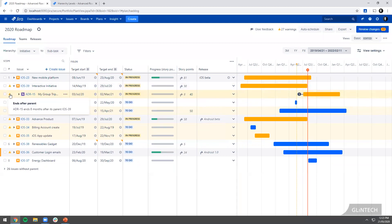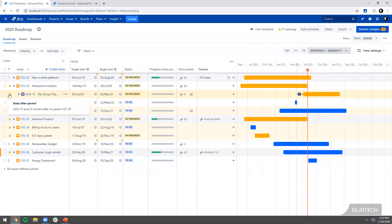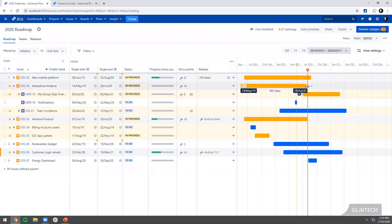This is quite common. It's usually because we've not updated the parent in some way. We've changed our plans, we started working on it, but we have not kept the left hand in sync with the right hand. What you end up with is a mismatch here. We need to keep on top of these warnings to make sure that our data makes sense, because some people will be looking at just the initiative level and they'll think that date is okay. But it's not because we've said that the children aren't finished till later.